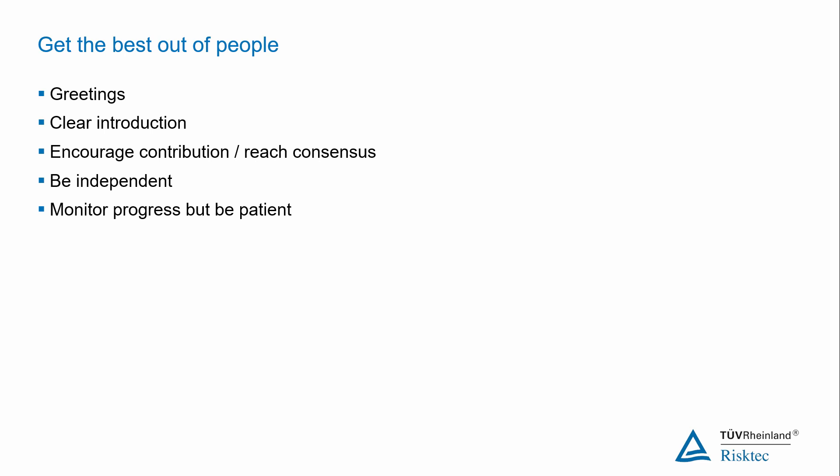However, do make sure you have a backup plan in mind just in case it becomes apparent that you are behind schedule. Be prepared to take shortcuts. Be strict about parking issues that can't be resolved for now. Follow those up outside of the meeting. And you can also review later parts of the workshop session by exception, asking how is this different from the section we looked at earlier?